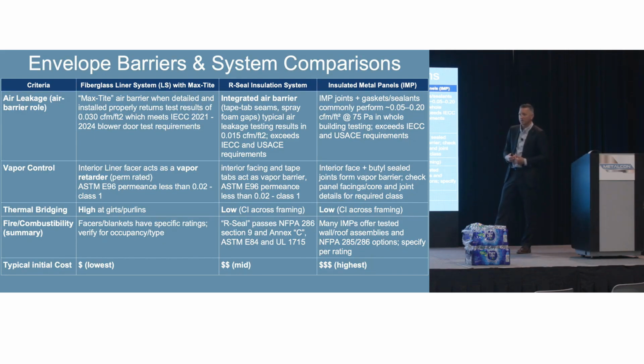If you have a manpower issue, maybe you have to spend a little bit more money on your materials and your systems to meet the energy codes, to meet the building codes, and that's how you can get away from some of those requirements for labor that you just can't find the right qualified people.